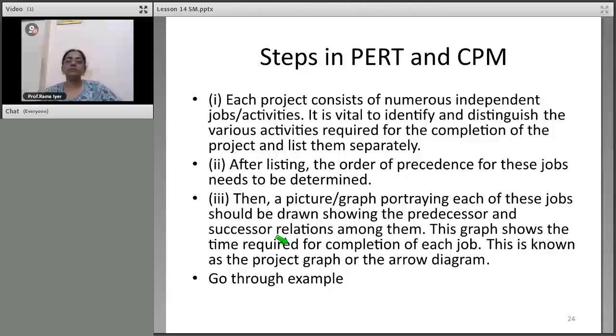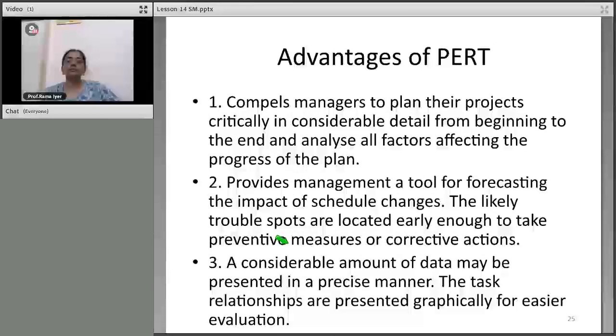See how they have taken the longest path. 14 plus 7 plus 4 plus 10 is 35 days. And your longest is 14 plus 10 plus 10, 34 days. So critical path being the longest path. Are you clear?